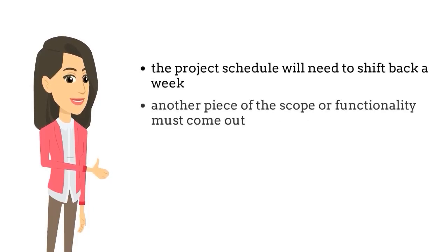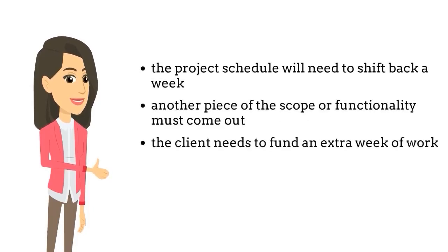remember, the project schedule will need to shift back a week, or another piece of the scope or functionality must come out, or the client needs to fund an extra week of work. Remember, there are no circumstances in which you can agree to this request without suffering the consequences later.